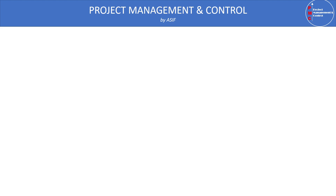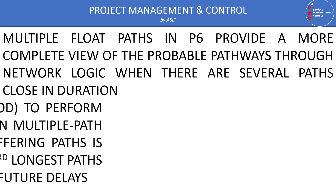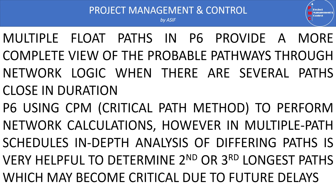When we are making any program in Primavera P6, we add activities, link them, provide relationships, and when we run the schedule, P6 calculates the network. There may be several possible paths in the network logic used to determine the critical path or near-critical path. P6 uses the Critical Path Method (CPM), where the critical path is the longest path in a program, determining the project duration. All activities on the critical path are called critical activities, and any delay in these activities can impact project completion.